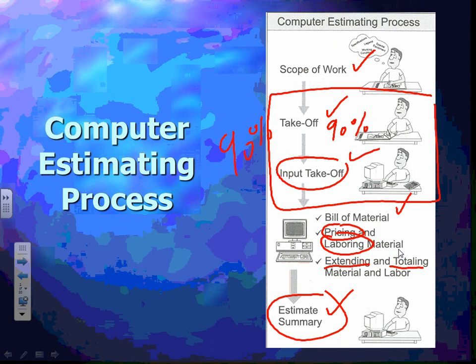The menu that we have in McCormick, guys, is really nice. I told you how we do. The most important thing to remember, assembly versus item. Always work with assemblies unless you can't find it, and then flip to item, and you should find most of the stuff that you're looking for. If you couldn't find something that you're looking for, guys, for this project, use something similar. So that's basically what we do.